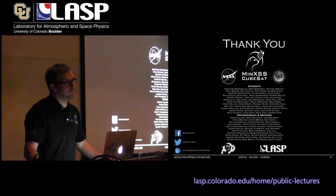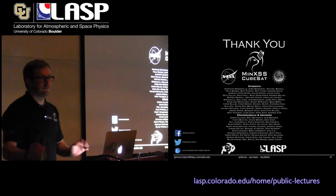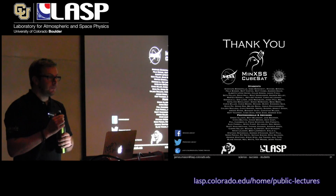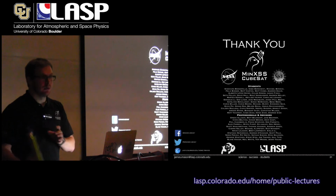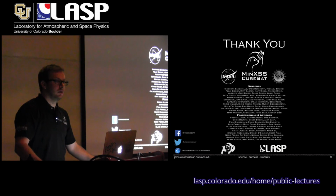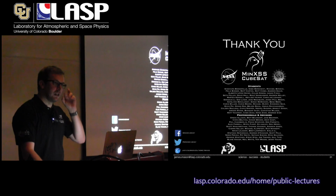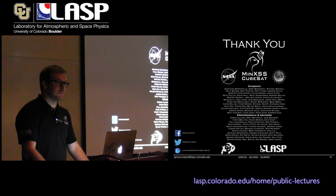But that's very risky. You might not pass the launch. Yeah, I don't know. Rick could probably answer that better than I could, why we accepted that one. So for CubeSats, there's typically a certain number of square meters per chamber for objects, the area and the capacity. And when you get above a certain level, then acoustic testing is beneficial. CubeSats are way below that level, so there's really no big help to doing acoustic testing. You get all of your vibration energy just through the vibe test. But if you have large solar arrays or something that are very lightweight and have a lot of area, they can respond to acoustic energy a lot. But CubeSats are so small, there's nothing really to respond to noise. Unless you have something in your system that's a tympanic membrane, you know, that filters.